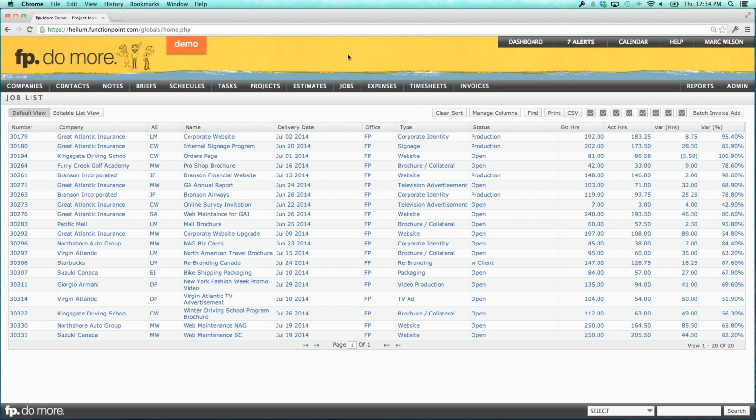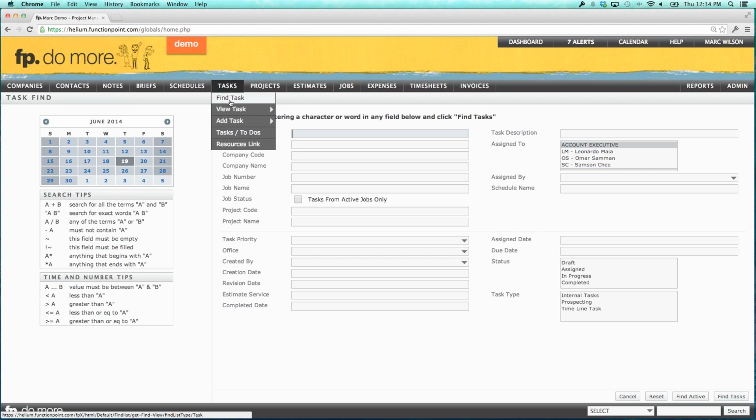A question I was asked literally just this morning was, I want to see all the tasks that were done. I want to see everything that was completed, maybe the last month or last week, and how many of those tasks do we go over on as far as time? How many went over budget with regards to time? What I might do in that case is a task find, and I can say, okay, well, I want to look at all the tasks that were completed between last Monday to today.